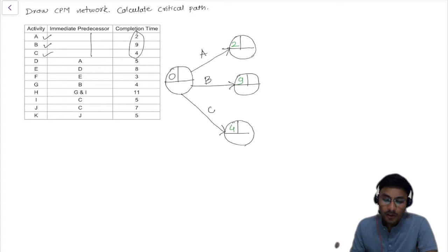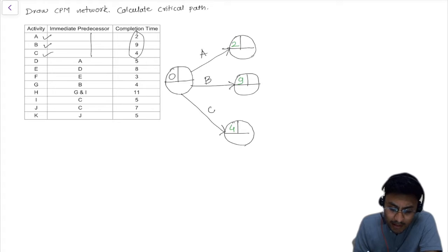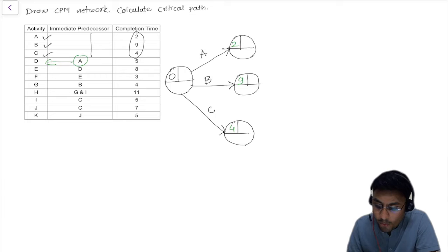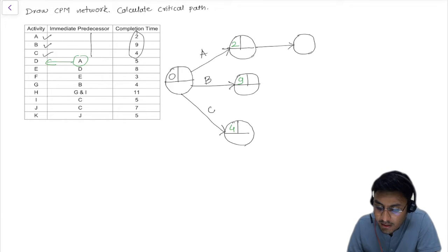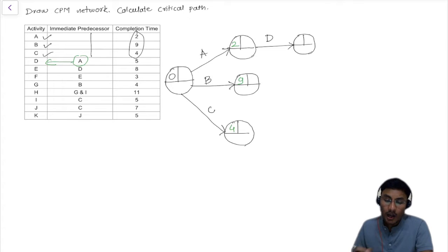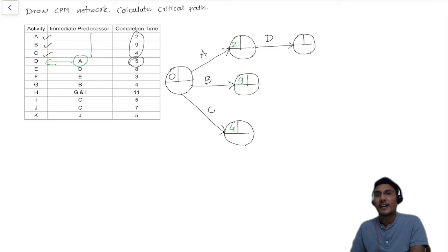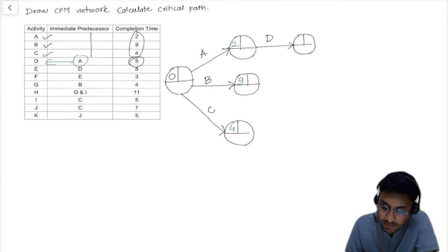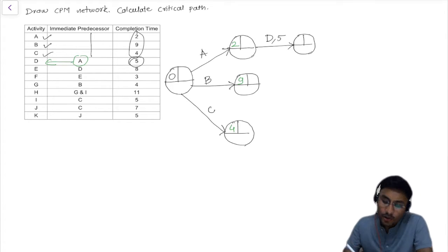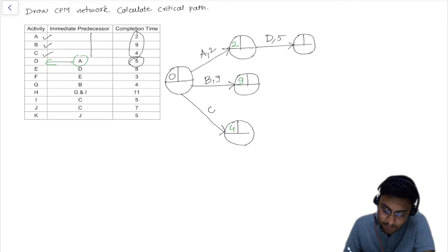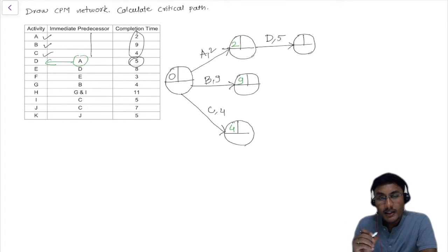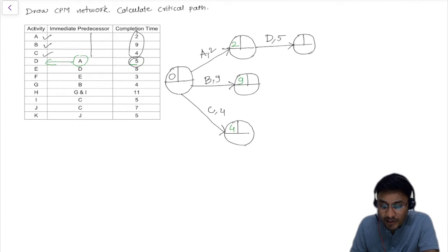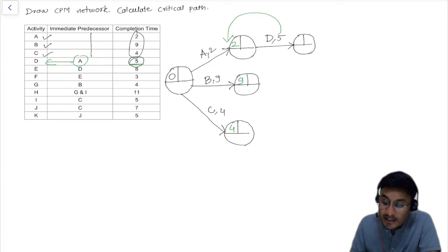Moving further, once A activity completes, D activity will start — so we need to draw a connection from A to D. D activity has a duration of 5. So the finish time for D activity will be 5 plus 2, which is 7.